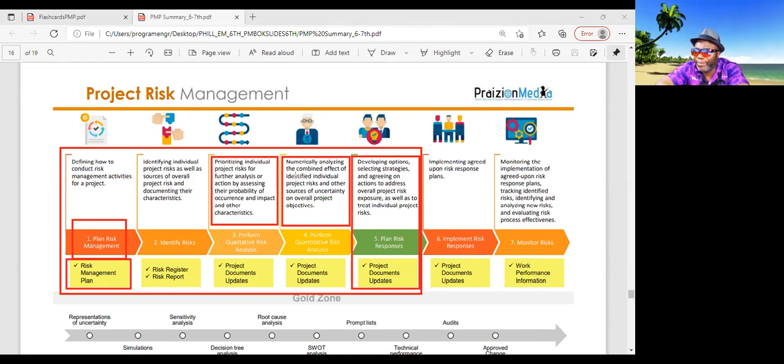So whatever you can do about these risks, you want to put them still in what we call a risk response plan, which, by the way, is in many companies the same as a risk register. So your risk register is really where all of these things are housed: the cause, the risk, the effect, probability rating, impact rating, probability in percent, impact in dollars, so on and so forth. And then some companies, they do the fancy stuff with the Monte Carlo in quantitative, but you will not be tested on Monte Carlos and running them on the exam. What you are going to be tested on is, do you know what this process is about? Do you know what you do after quantitative? Well, it's planning risk responses.